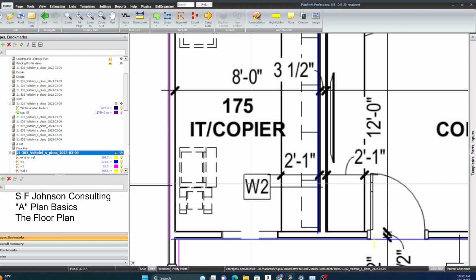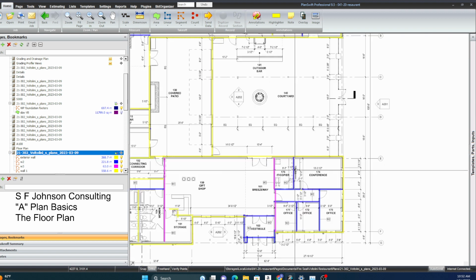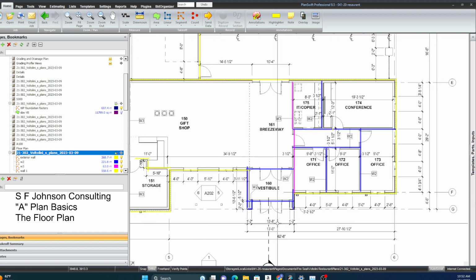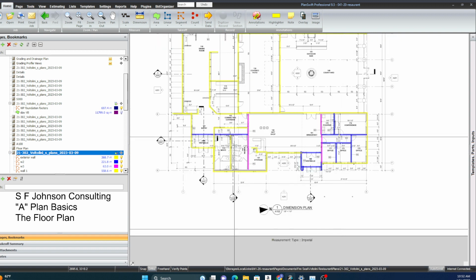So, first concern. Now, who needs the floor plan? Well, the framer, of course, and the drywall person, right? Because they need to know two things: how many linear feet of wall, which the floor plan will give you, but then you also, which is vital to preparing a very detailed, pinpointed, bare bones estimate, need to make sure you know what the heights of the walls are. And there should be somehow a way, either from the wall schedule, and more often than not from section views.